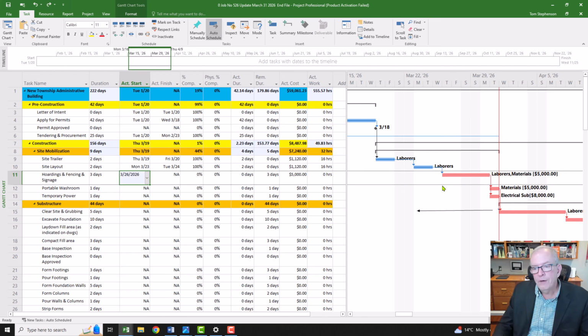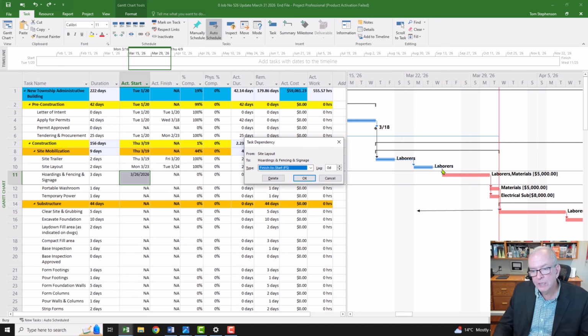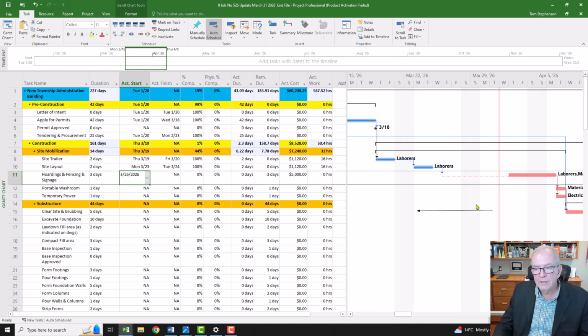So if I need to reschedule it, well, then I could put a lag to where I think it's going to be. So I could double click on this, and I could say, all right, I think this is going to lag out at about 5 working days, right? 6 days. We'll make it 6. And it puts it out here.